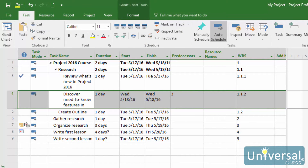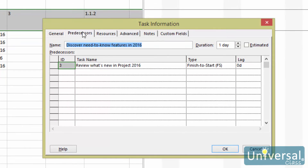Lag time occurs when you add time to either the start or the finish of a predecessor task, causing a gap in timing. Lead time, on the other hand, is when you subtract time from either the start or the finish of the predecessor task, causing an overlap between the two tasks. To set lag or lead time, click the name of a task to open the Task Information dialog box, then click the Predecessors tab. The Lag column is to the right of the dependency type column. To add lag, click the arrows to a positive number; for lead time, decrease the number to a negative number. Remember, days are the default timing, but you can change this to accommodate your needs.